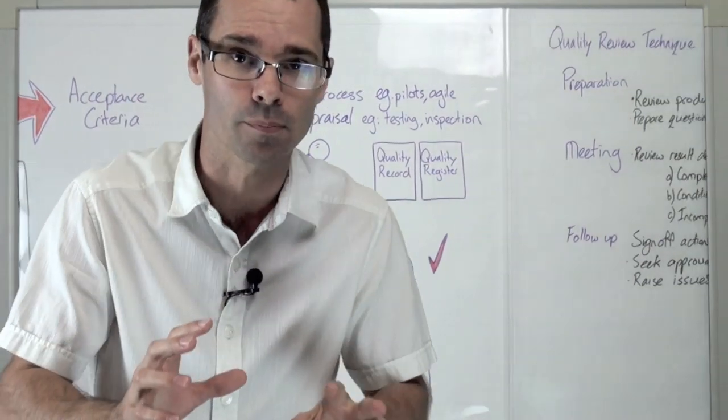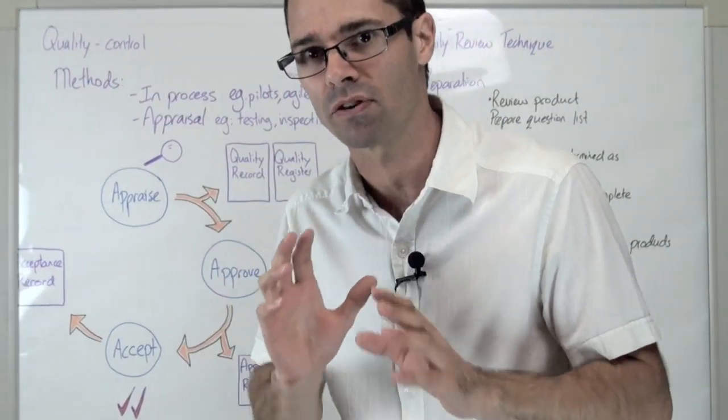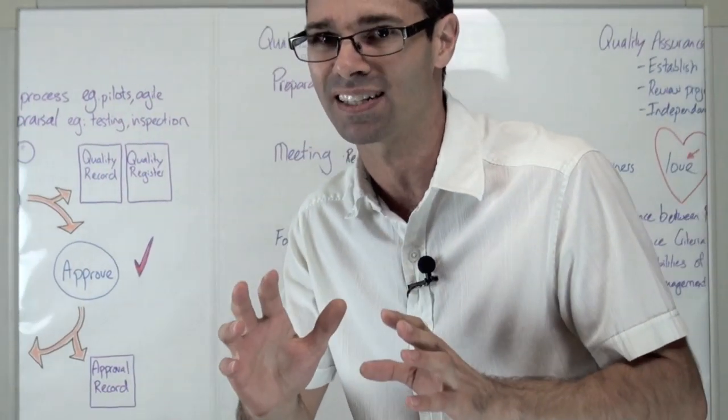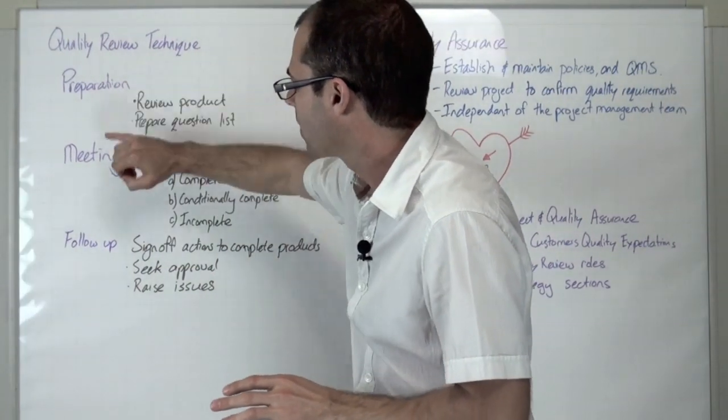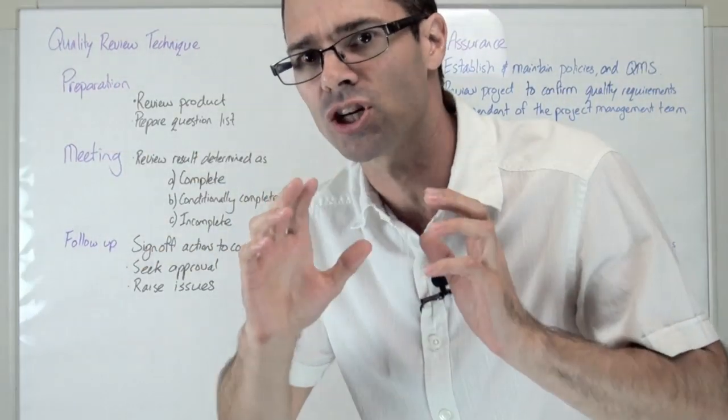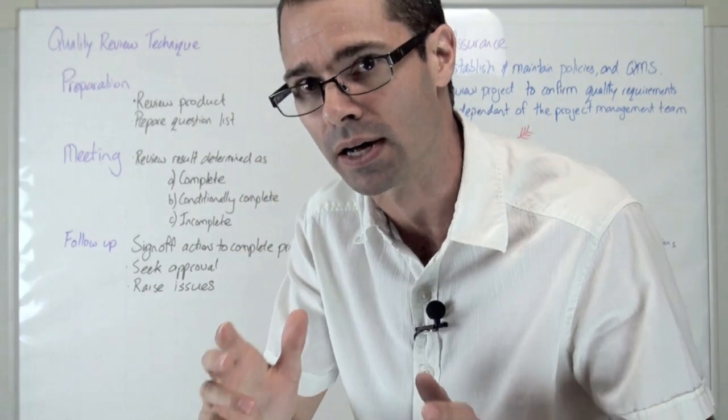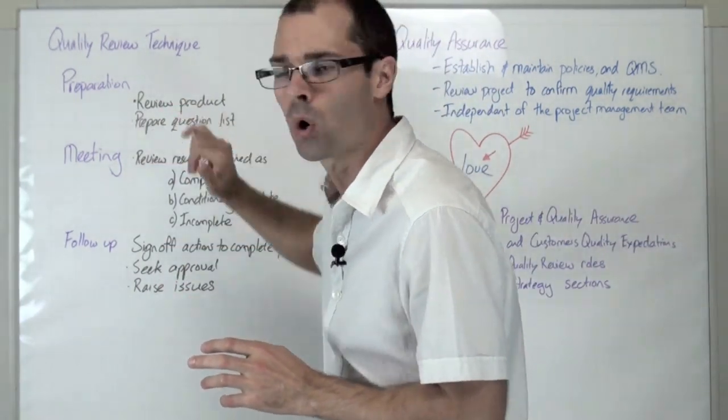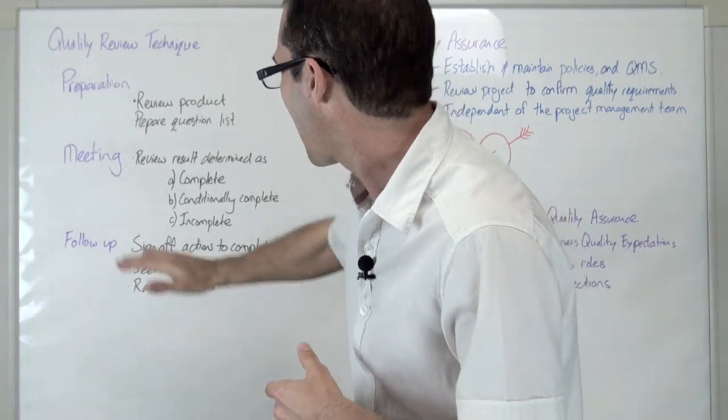Part of appraisal in Prince2 involves the quality review technique. Quality review technique has three steps: the preparation step, the meeting, and the follow-up. The preparation is when you actually evaluate the products of the project. You prepare a question list as well to present at the meeting.